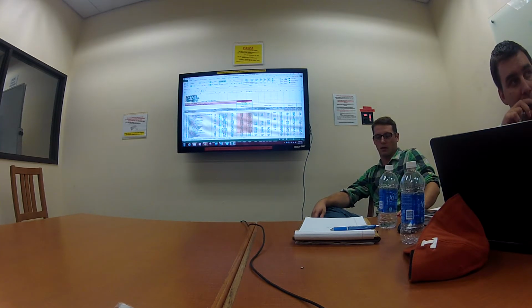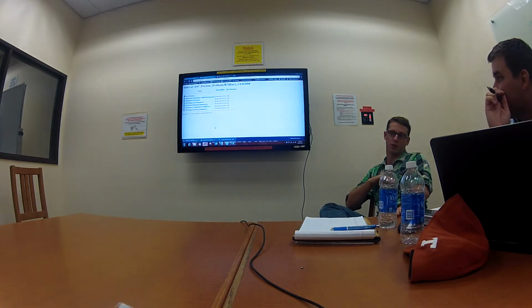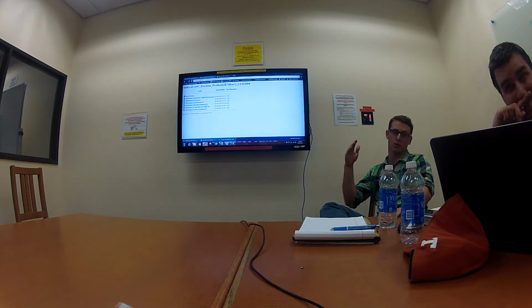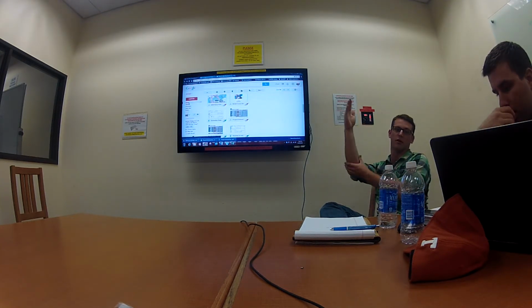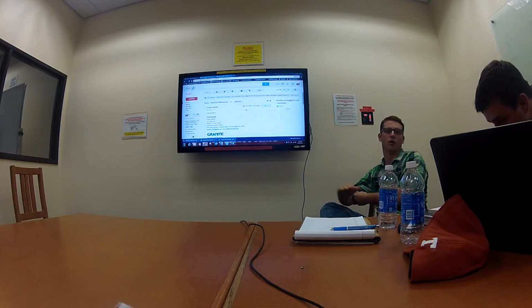Saying we fill in the items that we're bidding. Yes. The point is though, you have to spread your indirects and your profit over all of the items. So say you're only bidding 13 items, but you have 120, you still have to spread the cost.